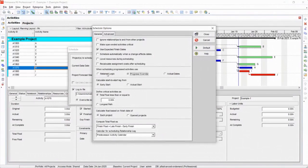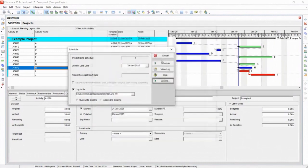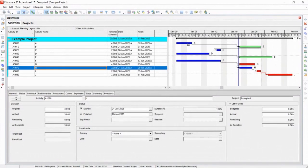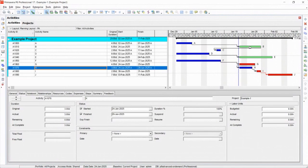So what happens if you do do progress out of sequence? Well, there's different thoughts on that, and I might have to remind myself all of them, but I believe what they would recommend you do is you would actually change the links. And you would say, okay, A to C and then C to B. You would alter the links and then continue progressing. You work that way.